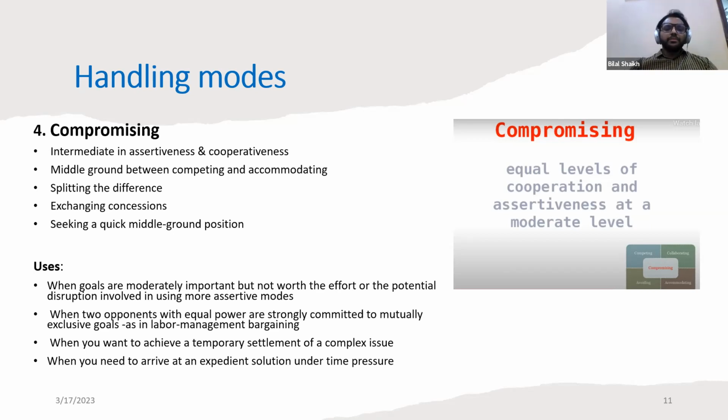For compromising, I believe it mostly happens with me when a change request comes in from the client. So this compromising situation happens a lot between me and the product owner, and in discussing with the teams. It is quite useful in those scenarios when a certain change has come in, and we take out certain story points and try to accommodate it if there's an urgency. So I believe compromising can be suited for such scenarios. Definitely. Yep.